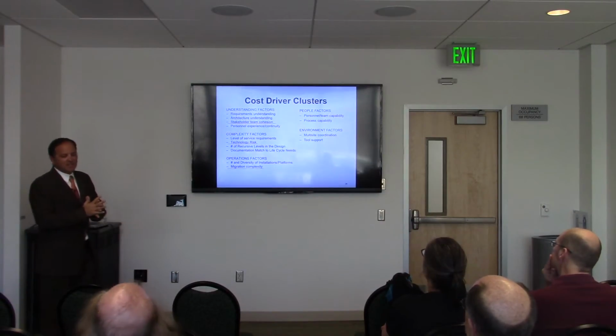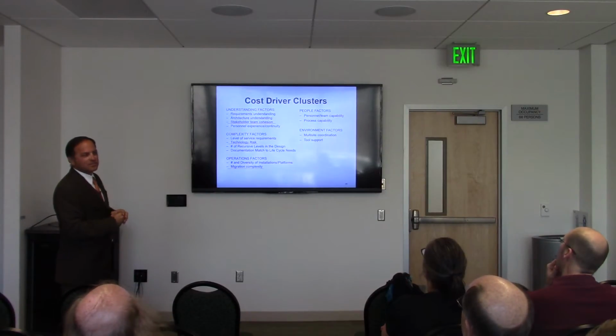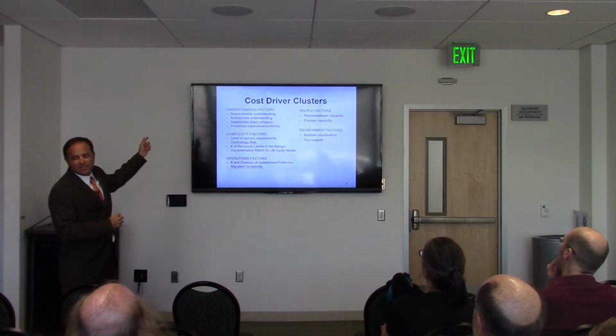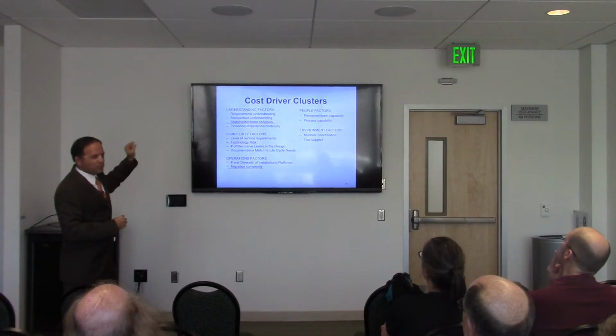So these are the kinds of things that drive the cost up or down. How well do you understand the requirements? Remember, the takeaway is that is the most significant cost driver in this entire model, requirements understanding.